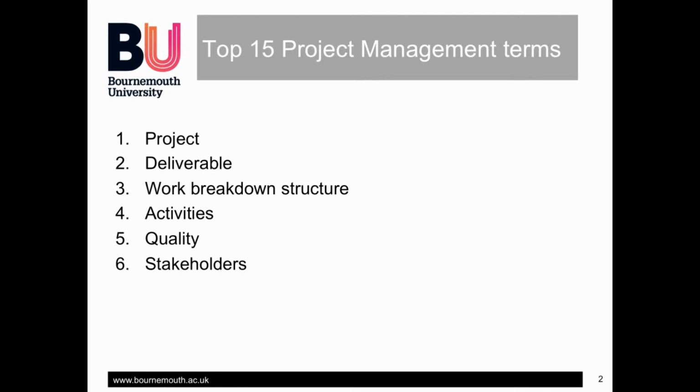It's a good idea to consider all the stakeholders of your project to ensure you've taken their needs into account. An example of a stakeholder for the party project, who may not be immediately obvious, are the neighbours who might be affected by the event. Sending the neighbours a note to advise them that the party is taking place may avert later problems.